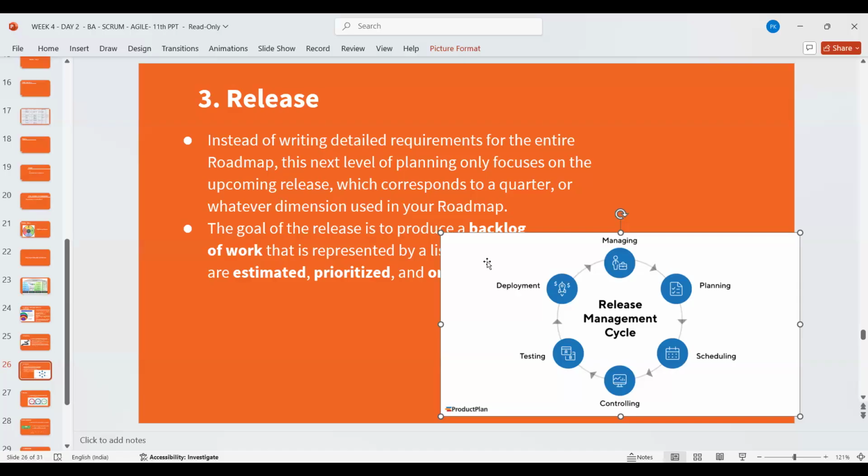Or assume. So yes, these things happen, and unless there is any major concern, it is agreed upon, though it is marked. It will always be noted that this is a release failure. There will be a date, you will cross that date and you will add a new date to it. So that record will always be there.